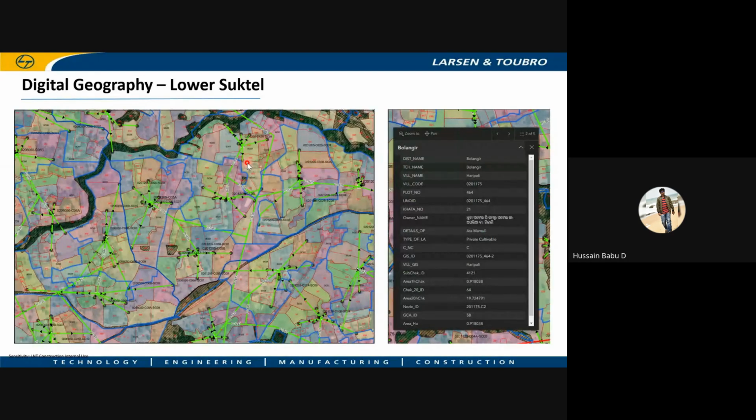If a person needs to execute a pipeline from a place, if he goes to that place, like how you check in Google Maps, it will show what pipe needs to be laid there, the length of the pipe, and all the details of the pipes: what diameter, what material, and the ROR records, like who the owner farmers of the particular lands are. They can see those details to get permissions and approval village-wise.